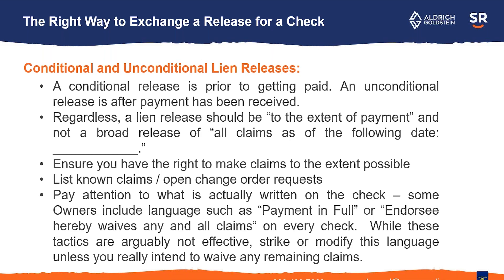Pay attention to what's actually written on the check. This is more of an old school thing, but sometimes people write 'payment in full' on the check even though it's just a progress payment, or something to the effect that the endorsee waives any and all claims. Best to not have that language on there so that you don't have to fight about what you were actually owed or whether additional amounts are owed. While these tactics are arguably not effective, watch out for that on the check, and work with the owner or through an attorney to strike or modify this language. Ultimately, you want the contract to be fair for both parties and the payment terms to be fair.